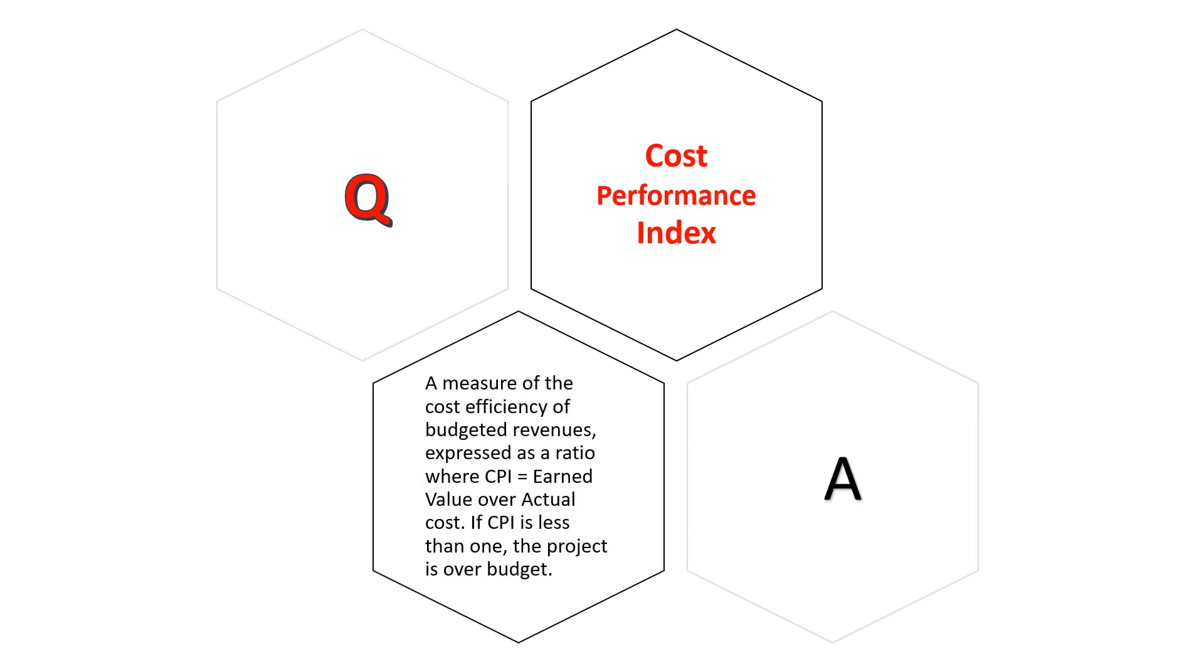Cost Performance Index: A measure of the cost efficiency of budgeted revenues, expressed as a ratio where CPI equals earned value over actual cost. If CPI is less than 1, the project is over budget.